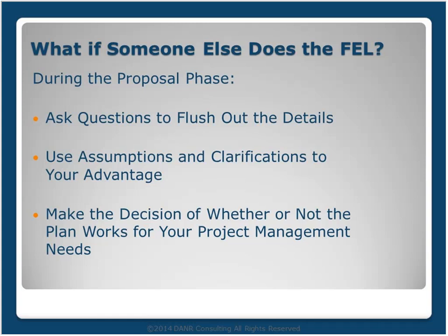So finally, look at the documents and see if you can use them as the basis for your project management activities. If there are FEL documents included, maybe they're not organized the way you'd organize them. Consider whether you can adjust how you're going to organize things to actually leverage those documents, or if they've organized it in a way that's not going to work for you, then look at what you can use or how you can shift things around to minimize your work moving into the project. And this could save you some dollars and lower your bid a little bit. So really the proposal phase can be a time where you can actually assess whether you can benefit from the FEL documents done by someone else.